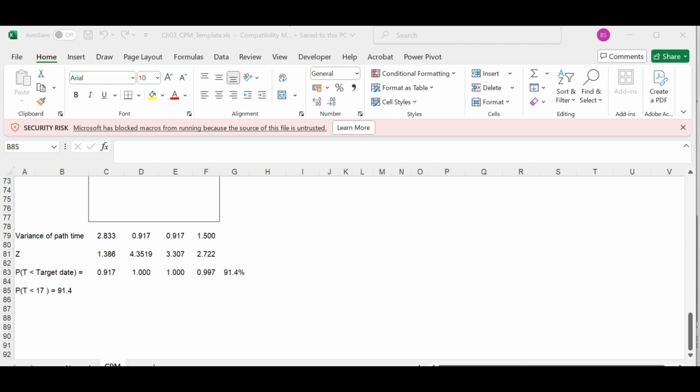Coming to the definitive cost estimation method, it is used in assigning the cost to each activity and disaggregating the cost decisions. It has an accuracy of plus or minus 10 percent. The cost of making a definitive cost estimate is very high, and it is a WBS based method. It's a very highly disaggregated estimate, and it is used in the micro planning and execution phase.